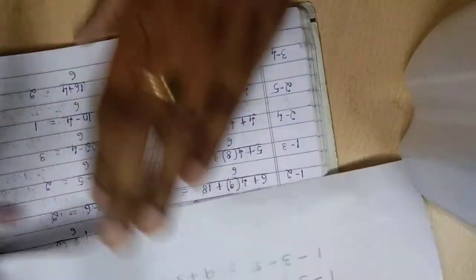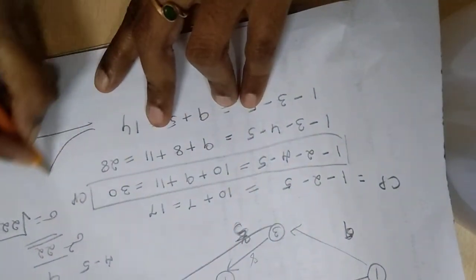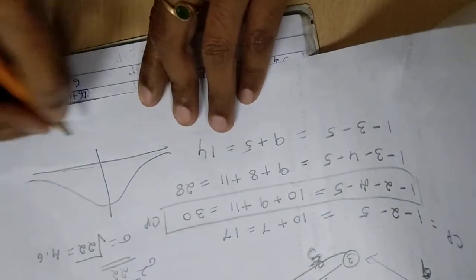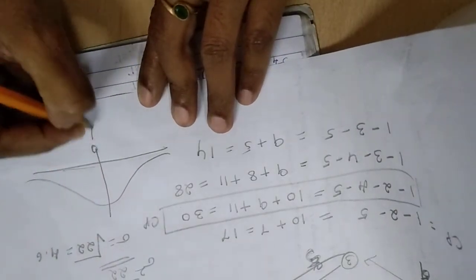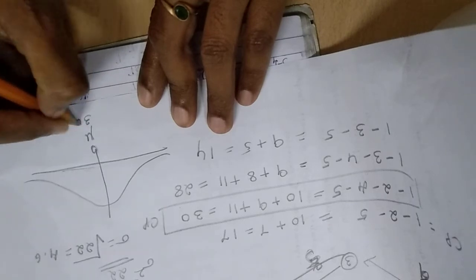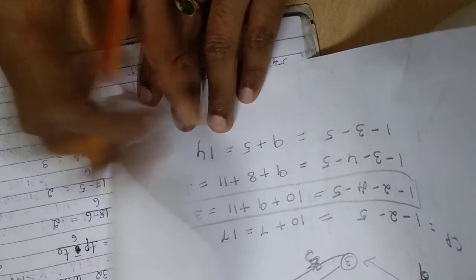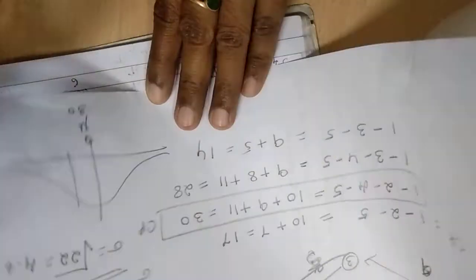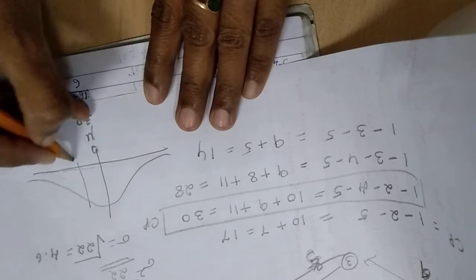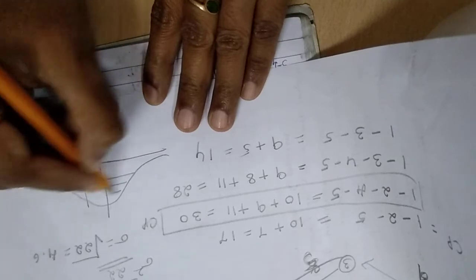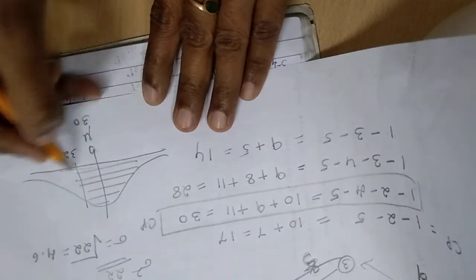So let us now work out the standard normal distribution. So here we have the standard normal distribution table. So it is represented this way in a standard normal curve. So here this is 0, this is mu. Okay, so the value is 30. Now we are given the thing that what is the probability that the project gets completed within 32 weeks. So what I should do is I should take up the area like this.